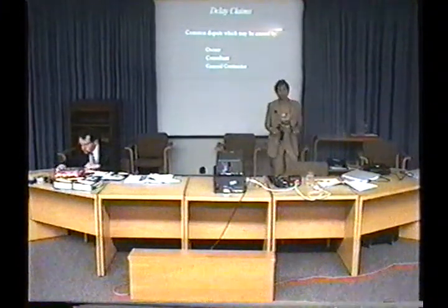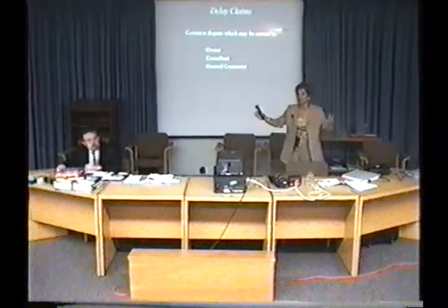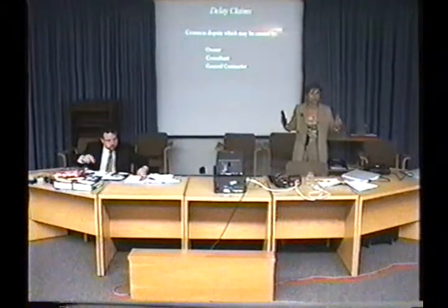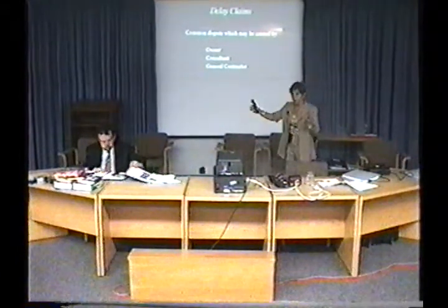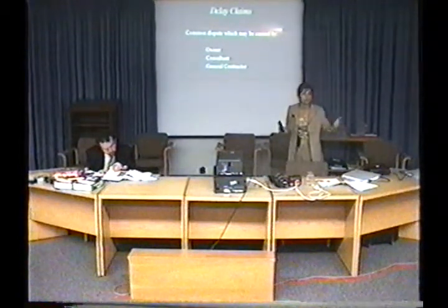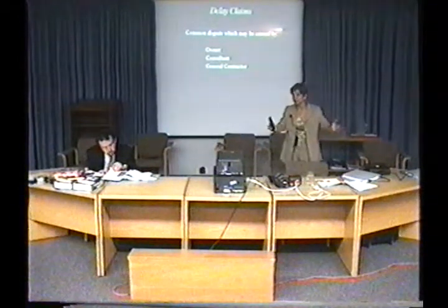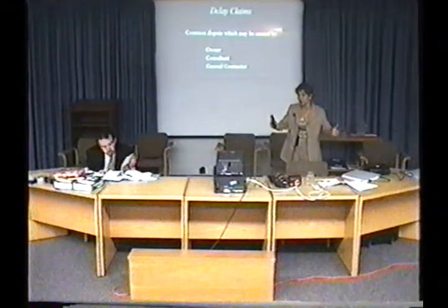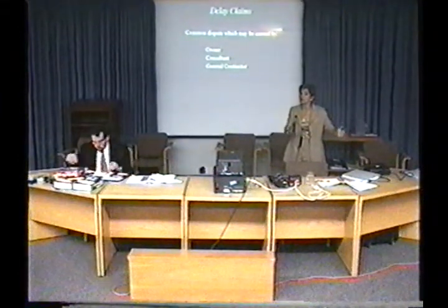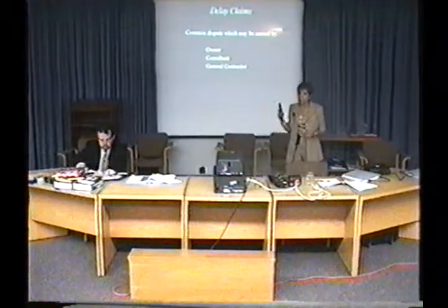And it's very common. You have a lot of scaffolding on the site. You're doing the repair of an exterior wall. You have 100 workers on the site, and all of a sudden you come across a problem. The consultant has to issue a change order right away to tell the contractors what to do. If they don't respond, these 100 workers are sitting and doing nothing. They're costing money. The equipment on the site is costing money. So the clock starts ticking for the delay claims.